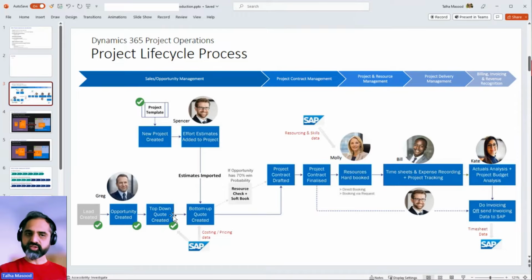Let's say when you do this effort for the same project, which we were trying to do in 300K, you figure out that no, 300K is too little. I will be taking at least 425K if I do the same project, right? So you could come up with that kind of scenario. This is where you create a bottom-up quote. But the important thing for bottom-up quoting is that you cannot do it just by using the sales quotation function.